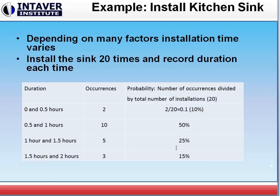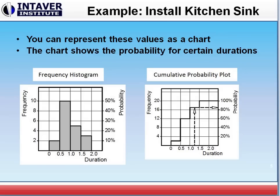From these values that we get, we can build these charts. These are very common charts that we see in schedule risk analysis: a frequency histogram or probability chart and a cumulative probability chart. On the frequency histogram from those values we had, we completed it two times in this time frame, ten times in this time frame, five times between an hour and an hour and a half, and again three times.